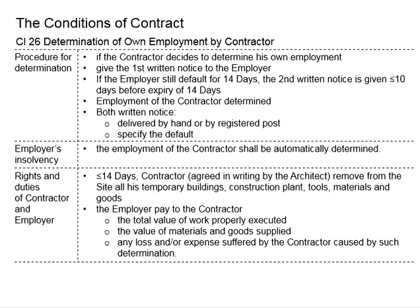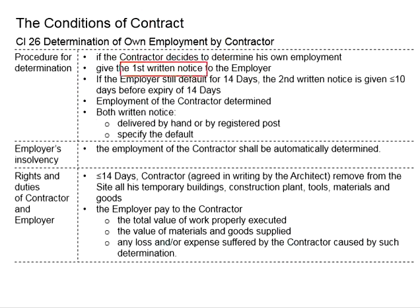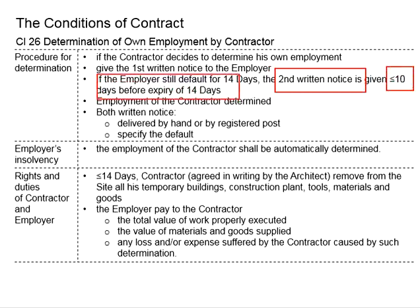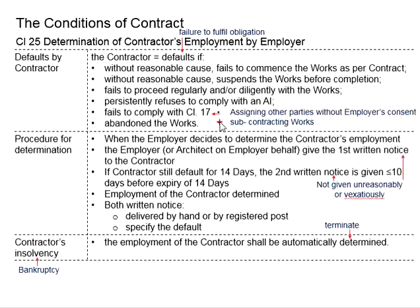If the contractor decides to determine himself from the employment, it builds on the basis that the employer is in default. The contractor will need to give a first return notice to the employer. This first return notice serves as a warning to see any intention of the employer to rectify it. If the employer still remains in default for 14 days, the second return notice may be given within 10 days before the expiry of those 14 days. This procedure is similar to the employer determining the contractor's employment, but in reverse.